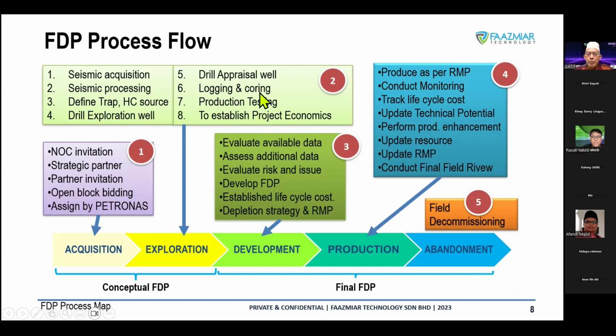We do coring, we do production testing. At the same time, once we have that information, we come up with a certain model, areal development, and then of course we establish the project economics. This is the preliminary project economics based on what we have, and we try to put in options and evaluate the risk and so on.